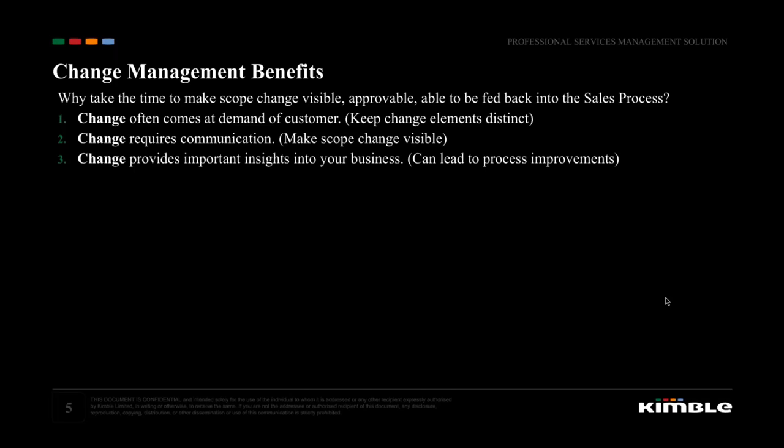Another benefit is change can give you important insights into your business. Down the line, you might see that you are consistently extending assignments by a predictable amount. It might make sense to begin forecasting for longer assignments. You might see that similar change requests are coming in from across different accounts. That might indicate the pre-sales gap.